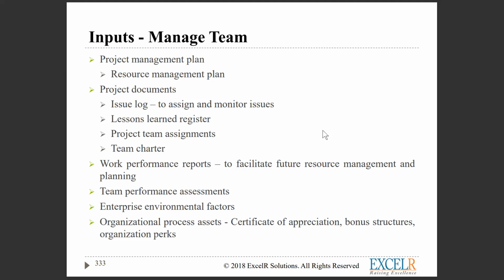Once you have given the KRAs and one month has passed, call for a meeting. One-on-one, say that I have given you these four steps, where are you on this? How are you performing? You measure that, then record it in an email.